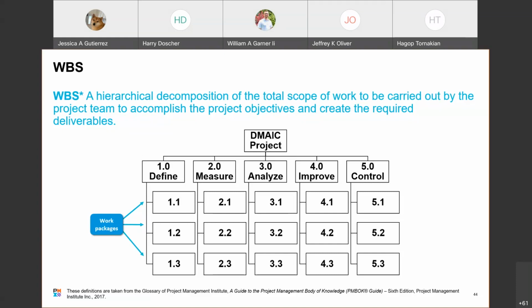So with Agile projects, you really want to work from a backlog, a prioritized backlog, so that if a team finishes something early or they have to postpone something and they have the capabilities, they're able to just pull the next item off the backlog. So you'll see this mostly with, as I said, predictive type projects.